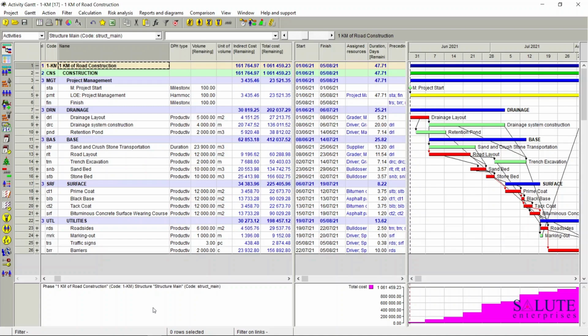Sometimes it's just a fixed cost contract. Sometimes it could be cost per unit of volume of work, and that will be paid under the contract. In other words, time and material based. This scenario is applicable when the volume of work is not really well understood at the time of the contract signing.